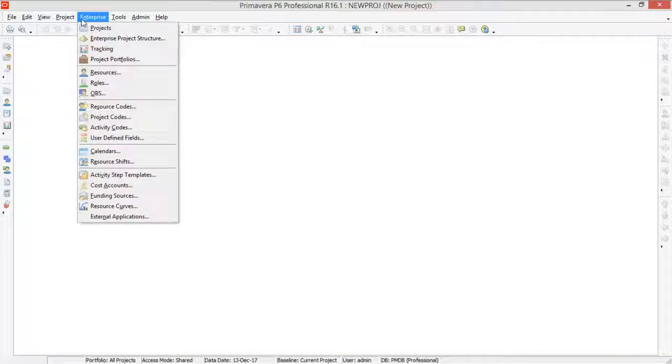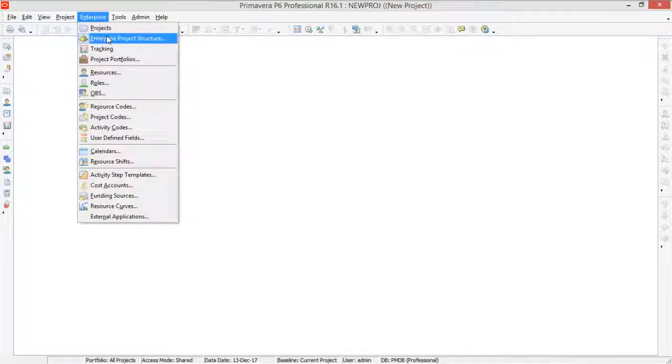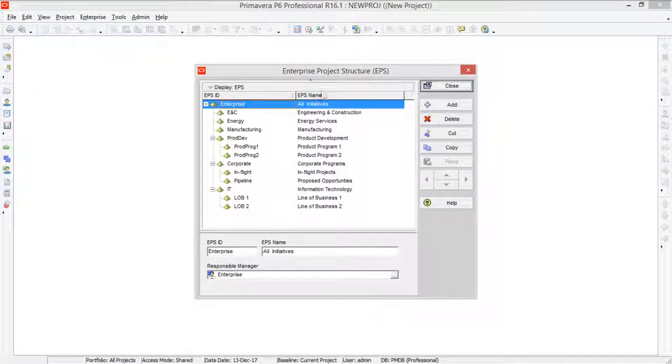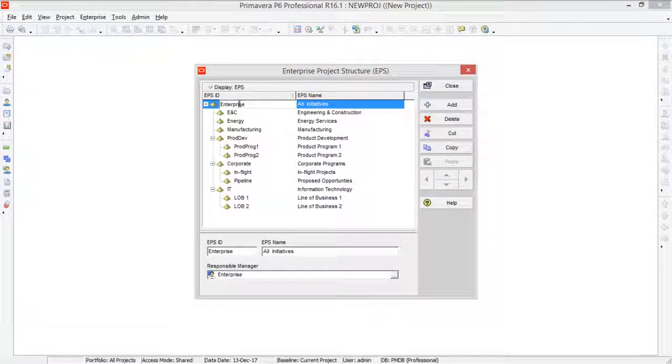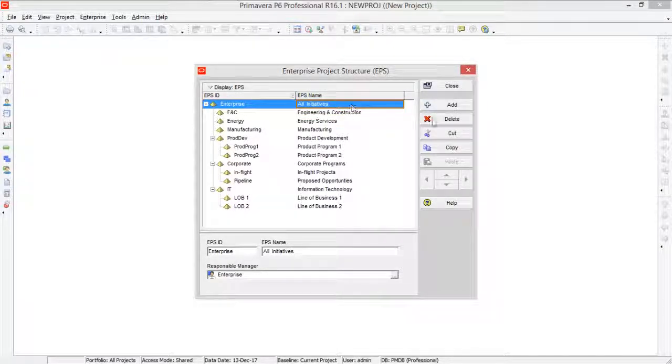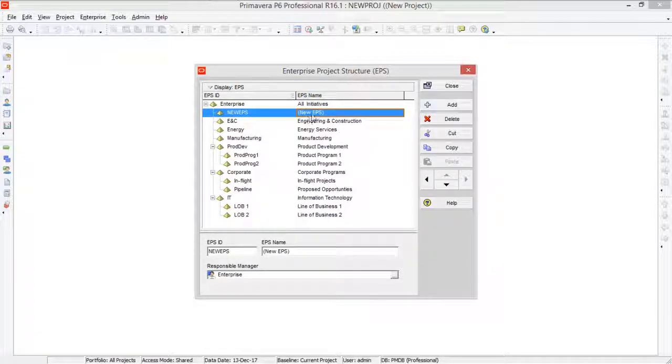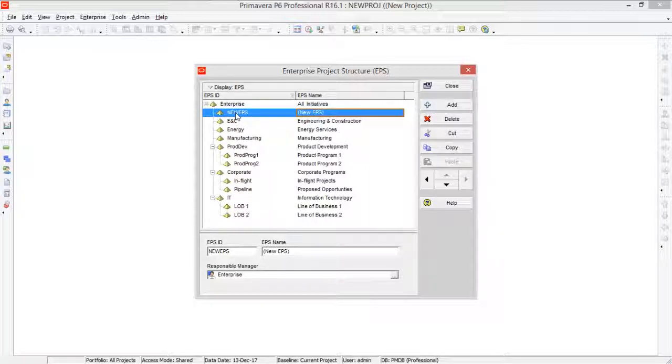So first we will define EPS. For that we will go to Enterprise and then Enterprise Project Structure. Here you can define another EPS. So just click anywhere and click the add. Look, so here you can see this new EPS has been defined.